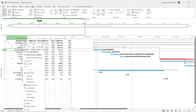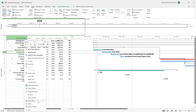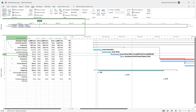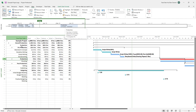Let me right-click on the Brainstorm task. You can see 'Add to Timeline' is an option. If you click on it, you can see that the Brainstorm task is allocated on the timeline, denoting its timeframe. Similarly, I can add other tasks to the timeline one by one, and you can see the overall details for each individual task.